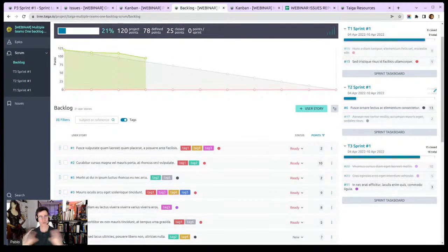Again, you could have fully overlapped sprints, like the 15 people basically have two-week sprints and they just have this split, or you could have longer sprints for team one and smaller sprints for team number two. As long as you have team commitment, you protect the sprint, and the different statuses of the user story are consistent within the sprint and the team. This is fine.